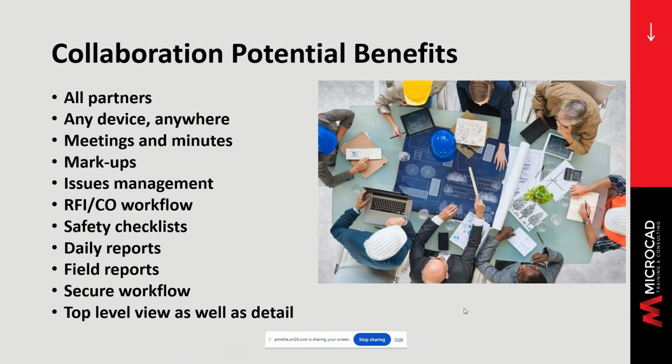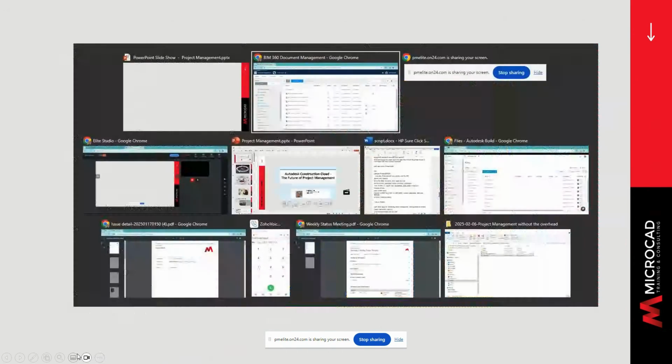Safety is a key concern of the PM, so they have to have checklists to verify the workers have the right PPE, lifts and moves are properly orchestrated, and equipment operators have the right training. And there has to be a daily report on tasks the various disciplines expect to accomplish and what really happened. Let's see what some of these tools look like.